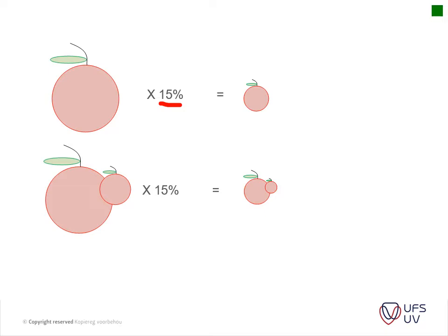So the main thing, as I explained in that lecture, was that whenever you have an amount and you add 15% like VAT, or P's and G's of 10%, to this, you end up with a 15% or a 10% here, which is then added to your original amount.